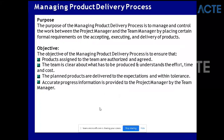Managing Product Delivery - you need to think of it like doing the actual development of a project. You need to know which team is assigned what to do, the team is clear what they need to develop in terms of effort, time, and cost. The planned products are delivered within tolerance - sometimes you may say that two defects is okay, but more than two is not okay, so that tolerance is there. Accurate progress information is provided by the team manager to the project manager. This is like a development phase.